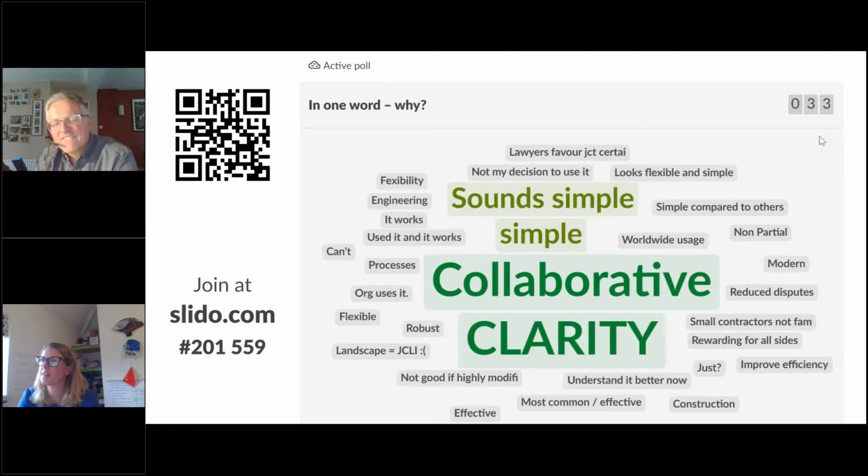Are there any clauses protecting the clients in case the construction regulation changes? That's a really good question. Fire safety. Okay, yeah, really good question as we're coming at the moment. Well, remember the contractor's obligation is to do what it says in the scope. So if the scope points to a certain regulation, then it's possible and fairly standard. Some clients will write in, your document's got to comply with fire regulation XYZ or any other that may be issued. So that could be written in within the scope document.